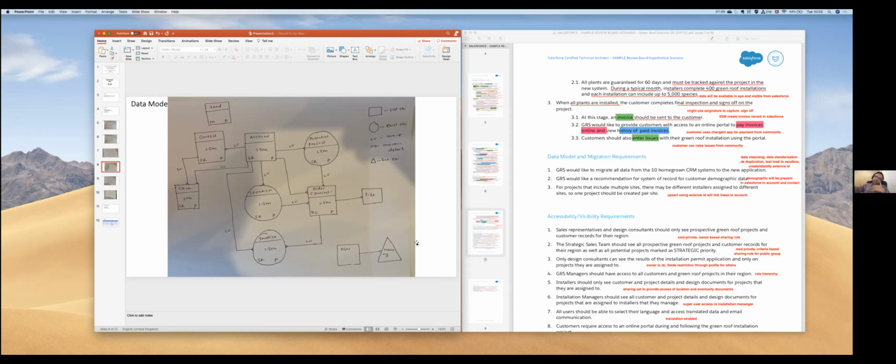And that's where we are doing this outside, to make sure what the batch size would be so that there would be no performance impact. Also, if you need to, you can disable the automation processes like validation rules or flows; all those things can be deactivated as well. And that's why we are doing the dry run, right? Because that's where you will get an idea, since you will be doing this a couple of times. So you will know the optimal batch size which can go without any performance problem. That will also help you in planning how much time it is going to take, so that you can plan for the production.